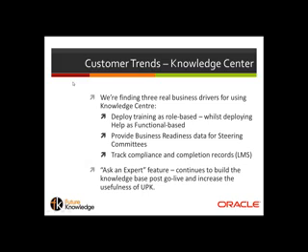So I think being able to say, let's look at the level of training uptake that's occurred. Let's look at some other factors that we can deduce in terms of how ready the organisation is. We can help the steering committee to use that as a gateway to make sound decisions about moving forward.